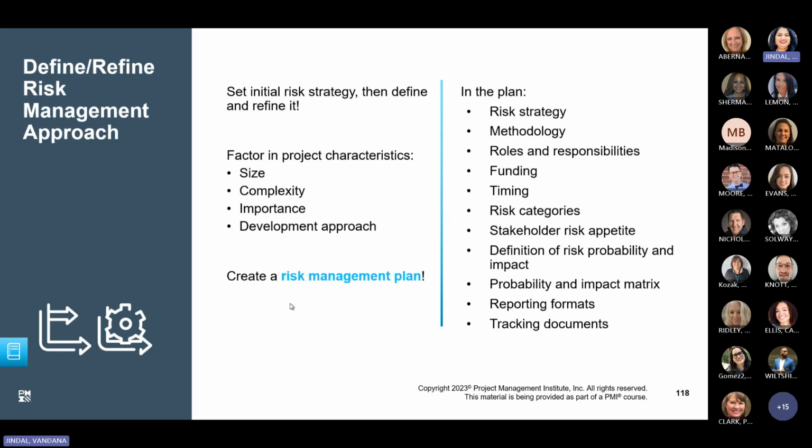If I give you an example of how size matters in risk, let's say there is a software company developing a software project with about 50 people and a timeline of about 18 months. This is a large scale that increases the potential risks such as communication issues and scope creep, all related to the substantial size of a project. To manage these risks, the plan could include strategies like regular team meetings, clear documentation, or defined project milestones.